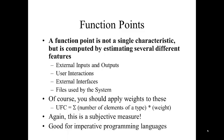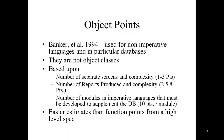Function points are good for imperative languages. If you're using something different, you may want to consider a technique called object points, created by Banker and his team. These are used for non-imperative languages, and in particular databases. They're not object classes, but based on the number of separate screens and complexity — one to three points per screen; number of reports produced and complexity — two, five, or eight points per report; and number of modules in imperative languages that must be developed to supplement the database, given ten points per module. These are easier estimates than function points for high-level specification.